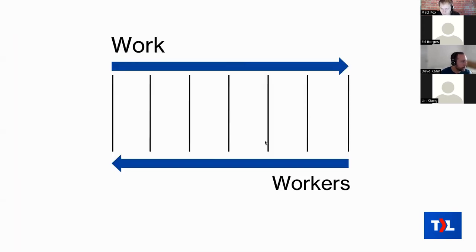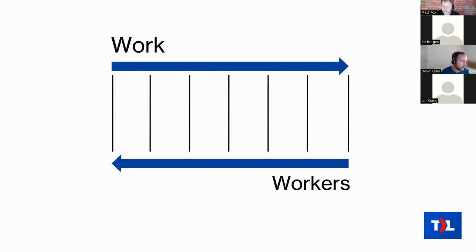One way to remember this: the work itself goes left to right on a Kanban board — from new toward complete on the right. The workers go the opposite way — they work from right to left. That's because we want to emphasize finishing work rather than starting new work. So we prefer to work on things closest to being completed, which we find on the right side of the board.